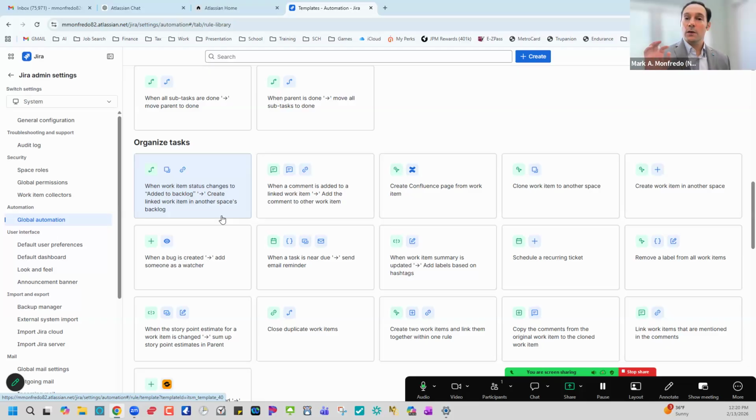And then we would tell the teams, we put a default story point value of 3. If you feel that it's bigger than that 3, you can assign a larger value. If you feel it's lower than that 3, you can assign a lower value. But at the very least, we're not missing story points. And you can do that for any metadata point.